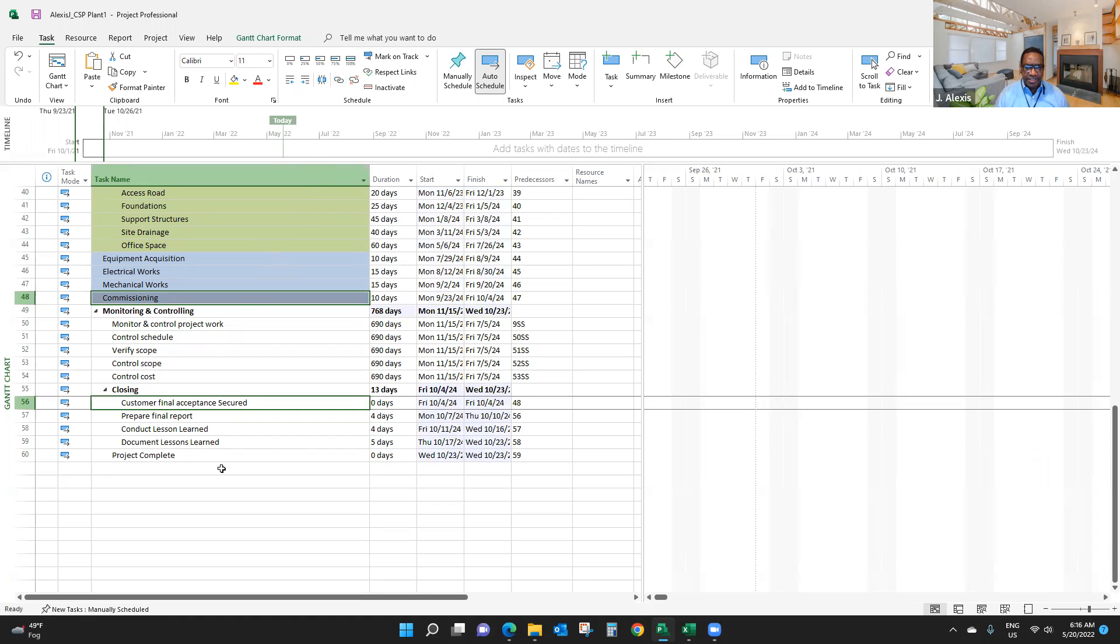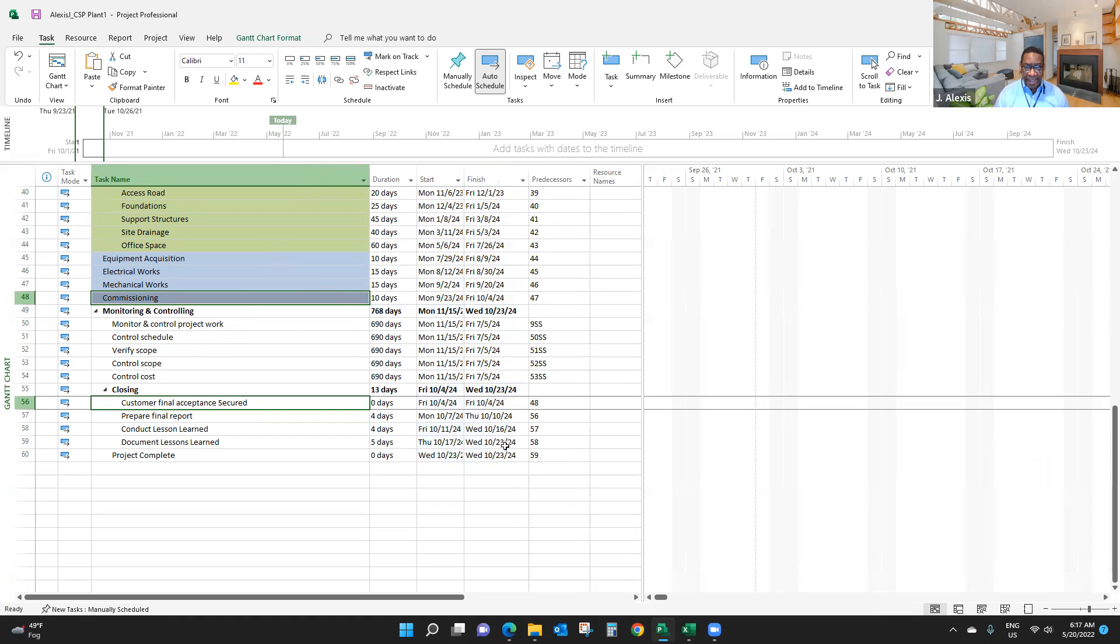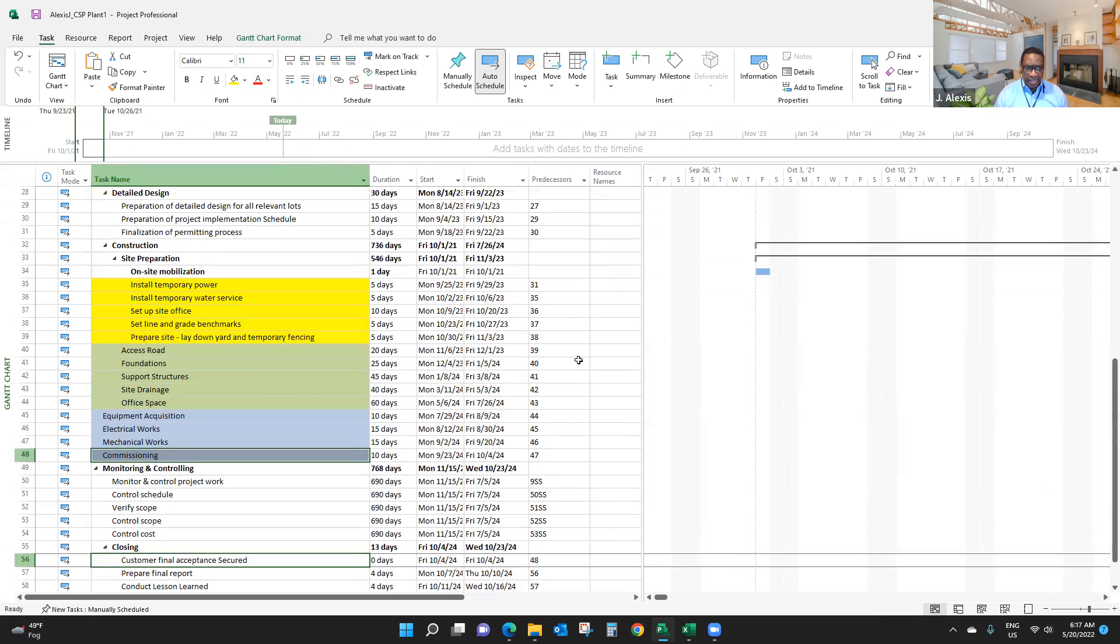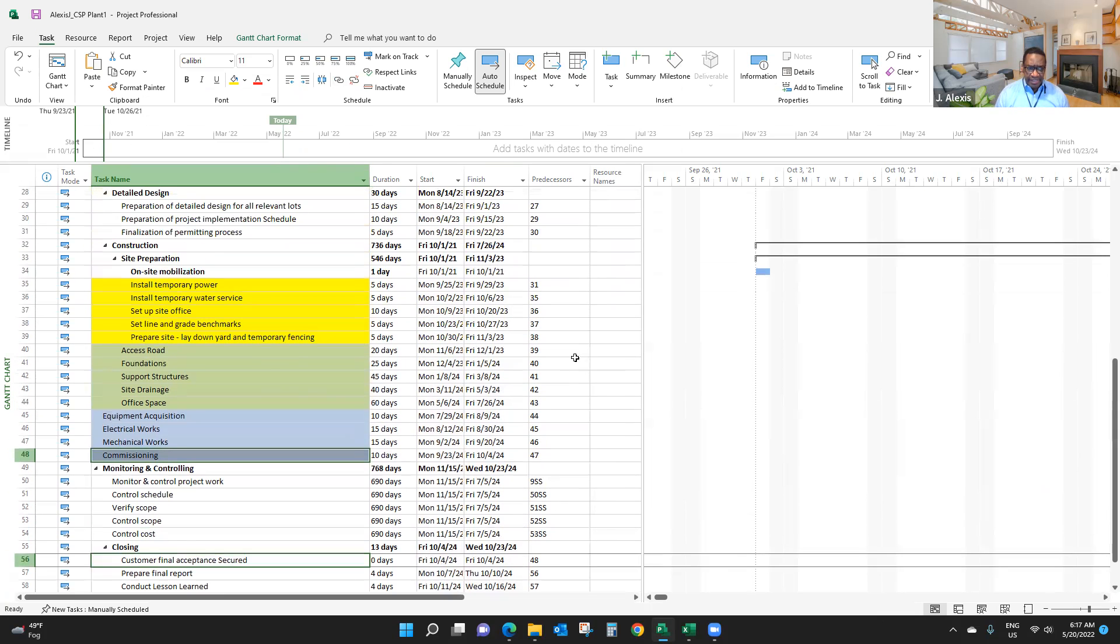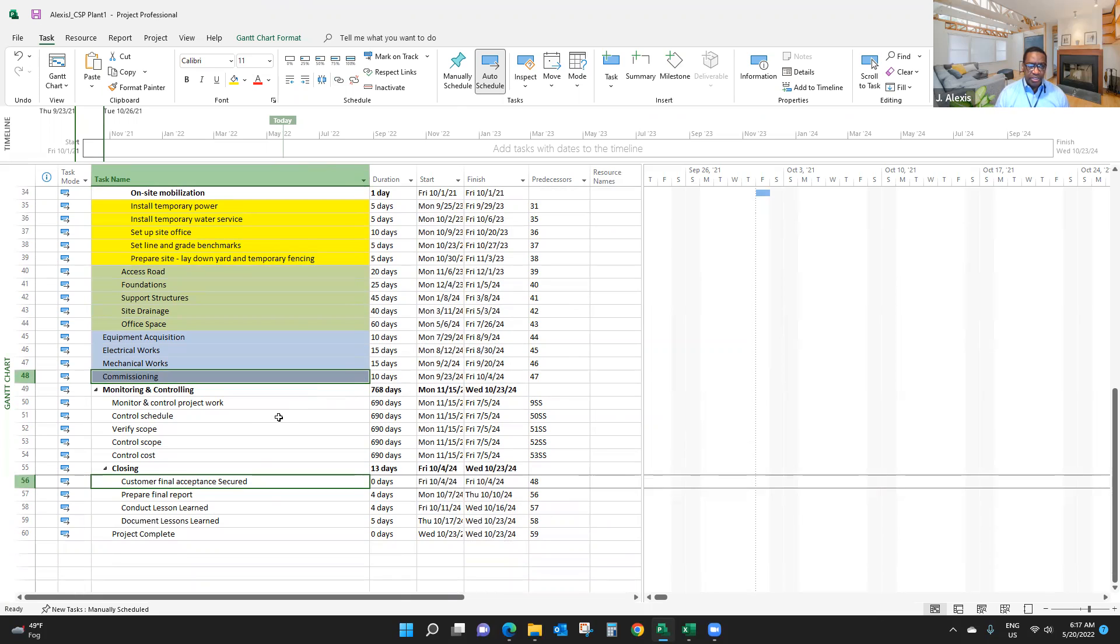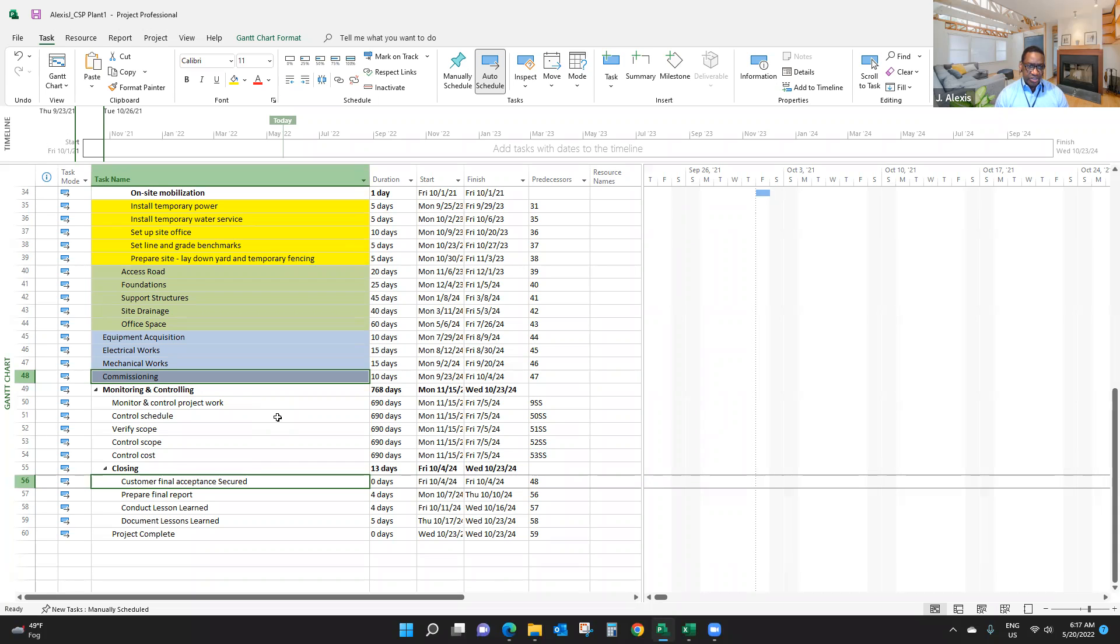You link activities together based on the nature of the work, whether it makes sense to link them and how to link them. As you can see, I'll link some stuff start-to-start, and others finish-to-finish. But in your project case, you can look to see what activities can be finish-to-finish and what activities can be start-to-start.